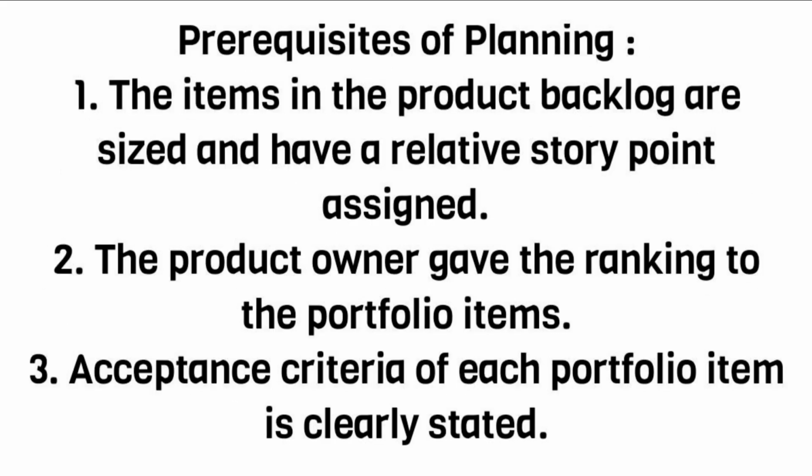Prerequisites of planning. 1. The items in the product backlog are sized and have a relative story point assigned. 2. The product owner has given the ranking to the product backlog items. 3. Acceptance criteria of each product backlog item is clearly stated.